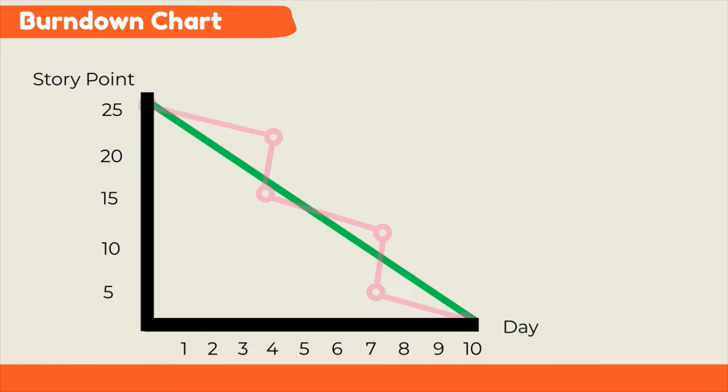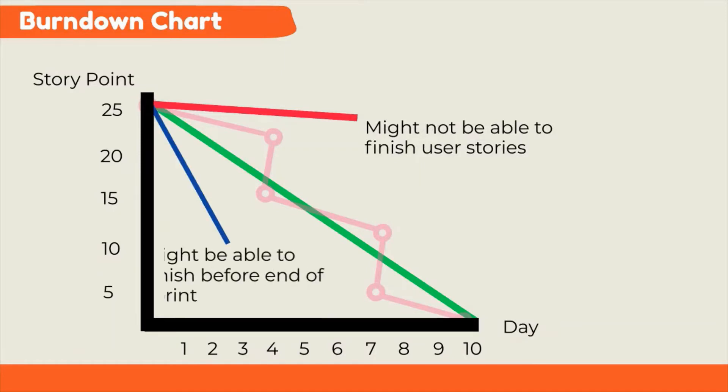If after a few days the team sees they are above the ideal line, they need to find ways to come back on track. Otherwise, they will not be able to finish their user stories. And if they are way below the ideal line, that means they might finish their user stories before end of sprint, and they can ask the product owner for another user story.